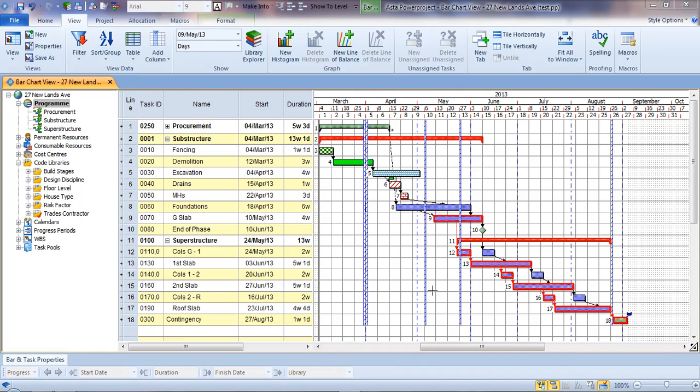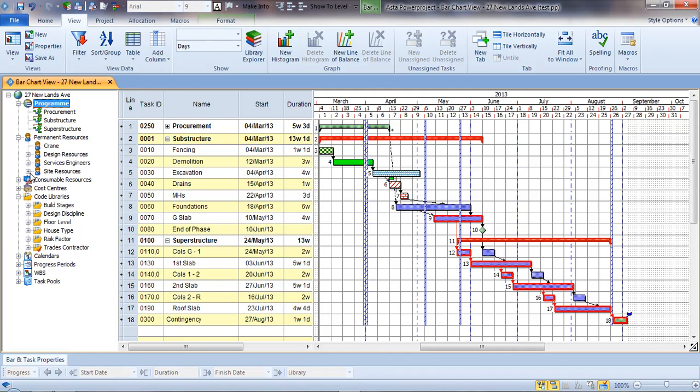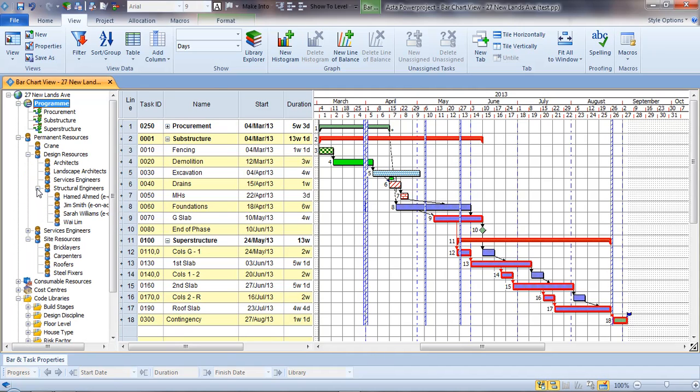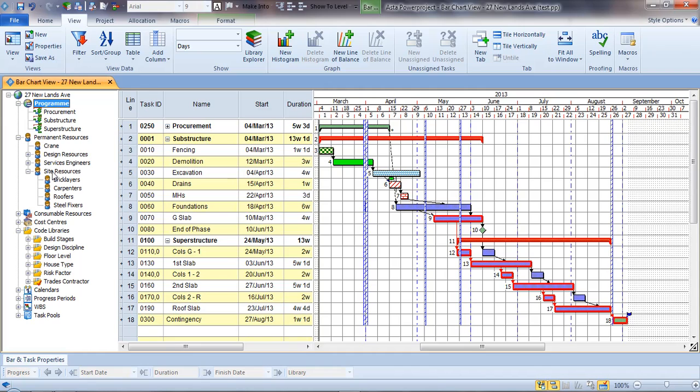So once we have the activities, then activities can also have resources and costs assigned to them. And resources are different to the colour codes which were shown, which are just responsibility codes. So in the resource library, we can have different resources, and these can be hierarchically arranged. So you can have parents and children in this library, which greatly simplifies the list. And the folder level is also quite an important concept about skills.